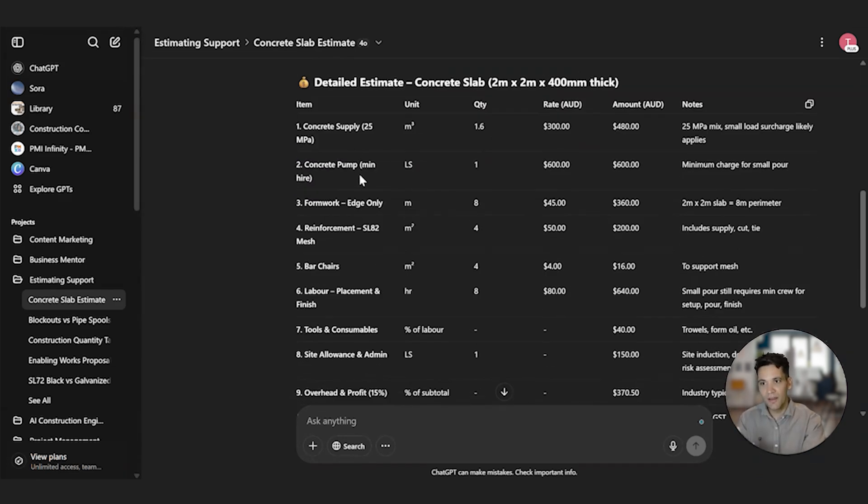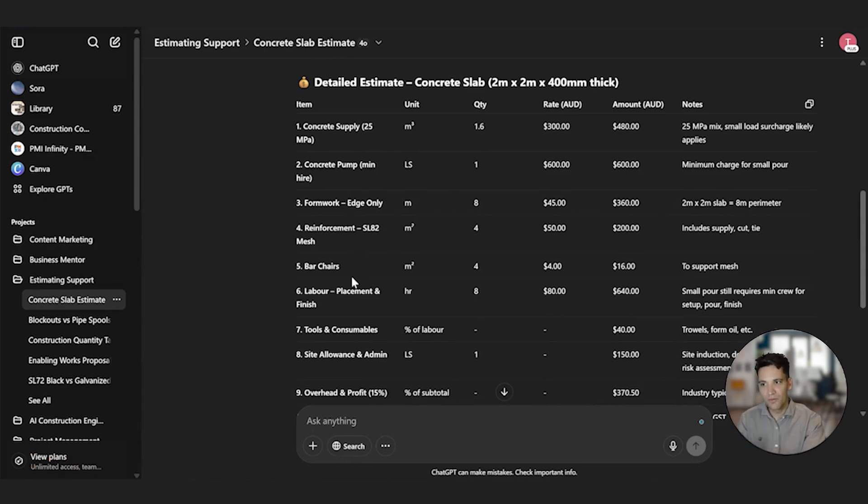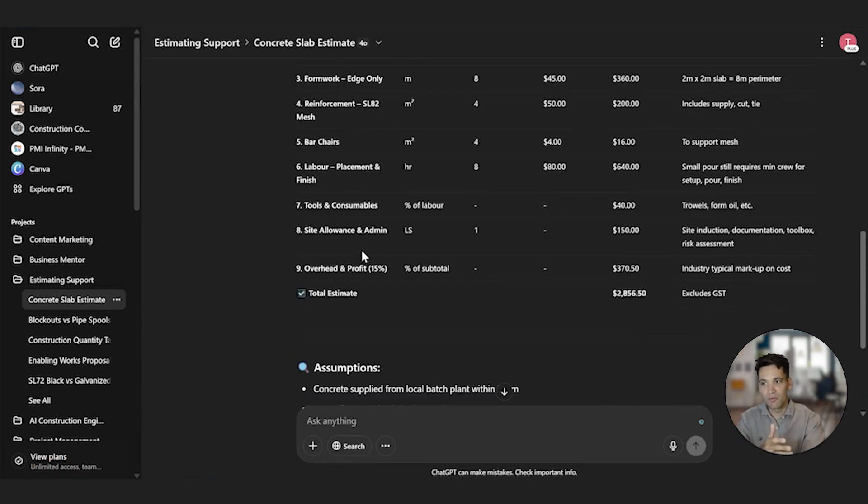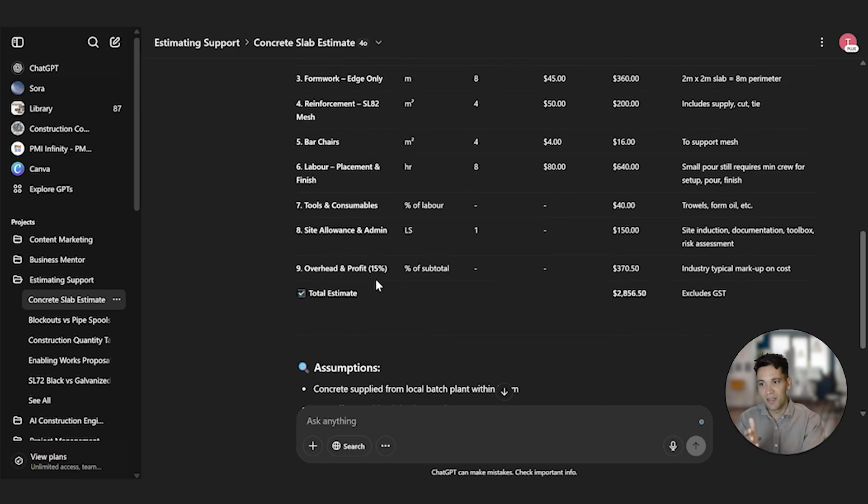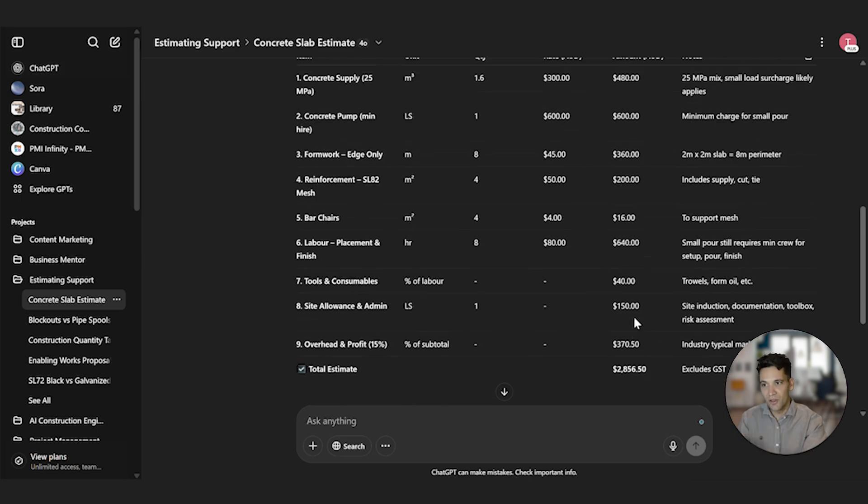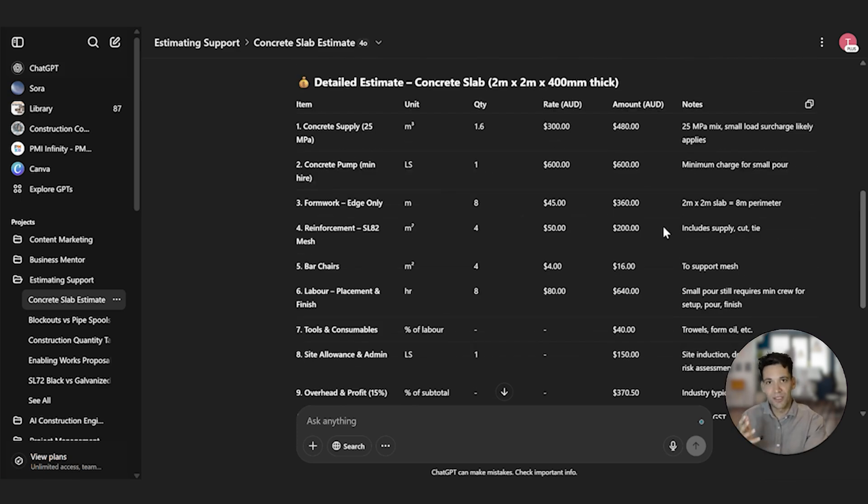It's given me a detailed cost breakdown of my concrete slab. So it's included concrete supply, concrete pump, formwork, reinforcement, bar chairs, labor, tools and consumables, site allowance and admin and overhead and profit. And it's come up with a price of $2,800. And just very quickly looking at each of these rates, they actually look pretty good.